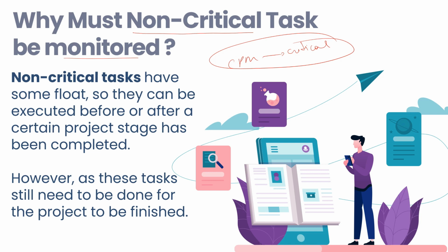In this case, they become part of the critical path. This is what happens many times in professional life: people delay activities, and at some point those activities become critical.